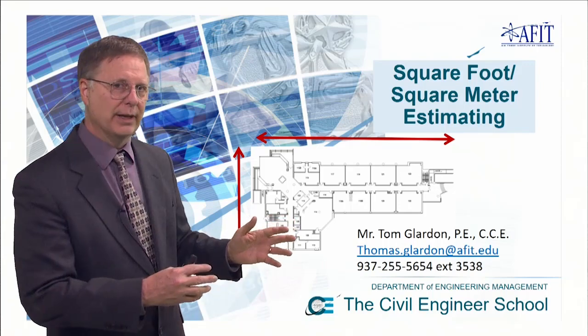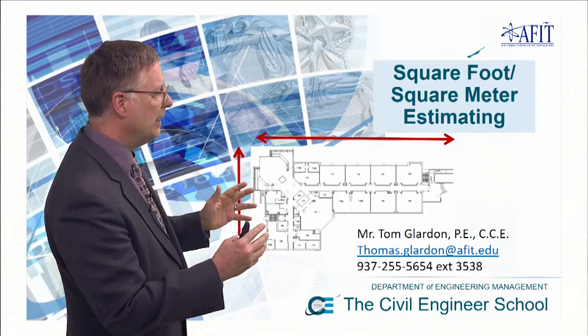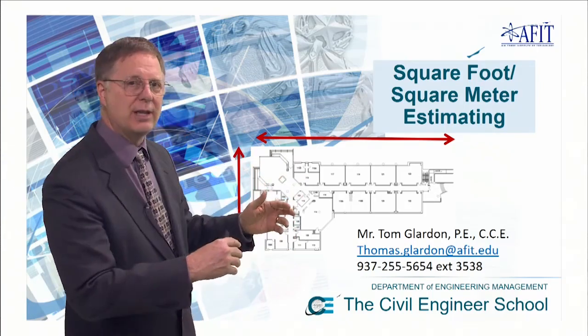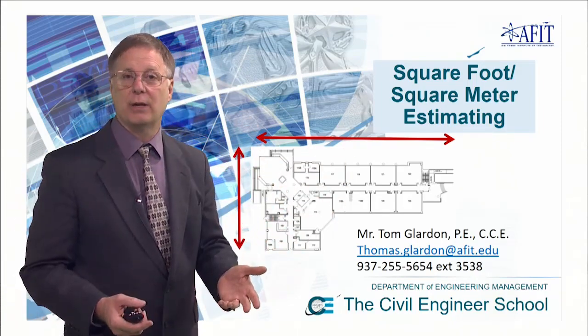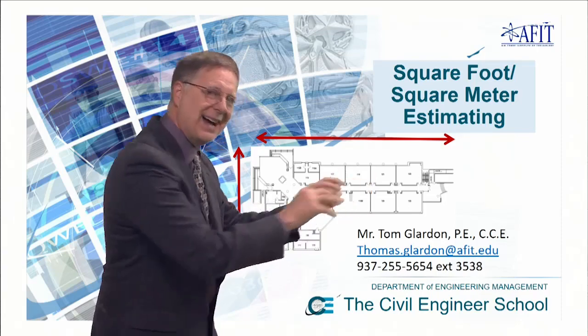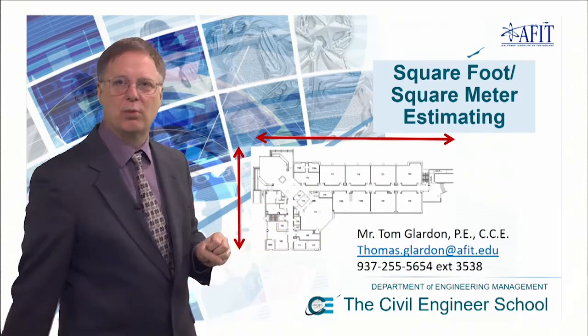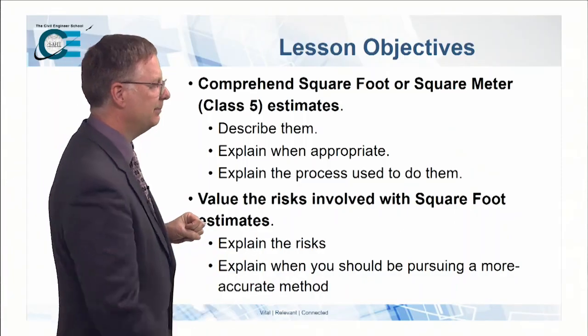If you remember, the square foot, square meter estimating method is this: I've got a facility that I'm going to be building, and what I need to do is come up with the square footage of that facility, whatever the measurements are, and then I'm going to be able to generate a price. It doesn't matter what's going on inside the facility. I'm just going to generate a price based upon the size of it.